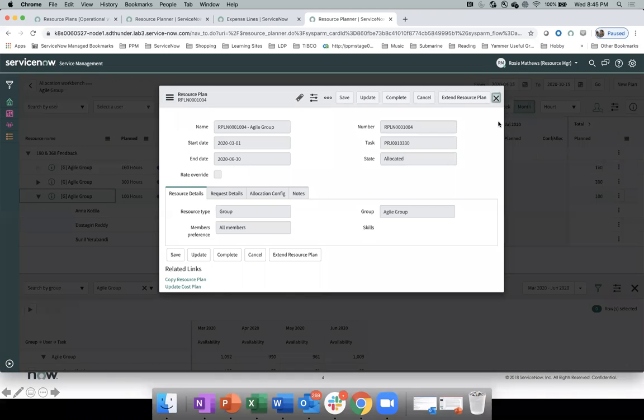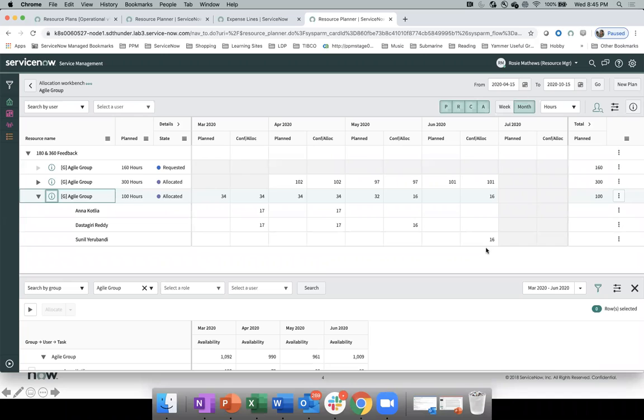So this is on the shift allocation. The last piece is, everybody was thinking this work should have been started in March or whatever, right? But due to some reason, the whole work couldn't be started, okay? And now the project manager says, I thought it would start in March, but it is not starting. Can you please make the same allocations, leave them as is, but just move the whole resource plan by 1 month.